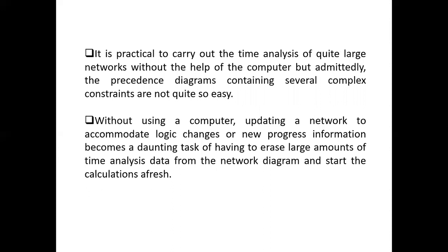So those calculations become complex to a point whereby an average brain won't be fast when it comes to computing these things. So what I was saying, if you look at point number 4, without using a computer, updating a network to accommodate logic changes or new progress information becomes a daunting task of having to erase large amounts of time analysis data from the network diagram and start the calculations afresh.